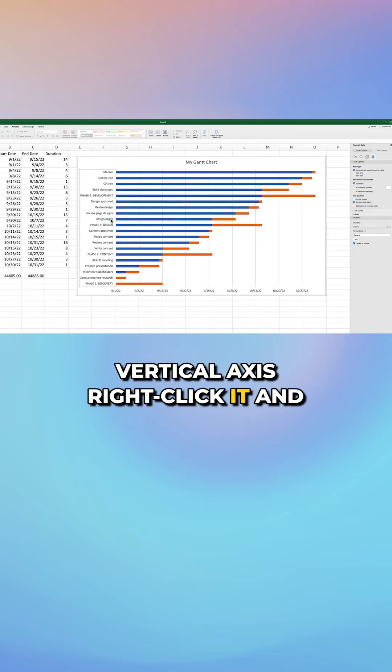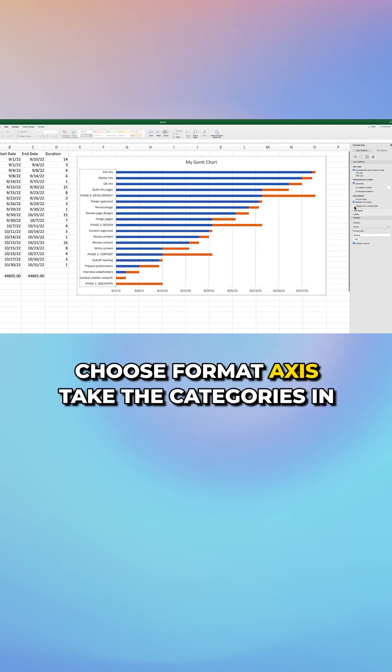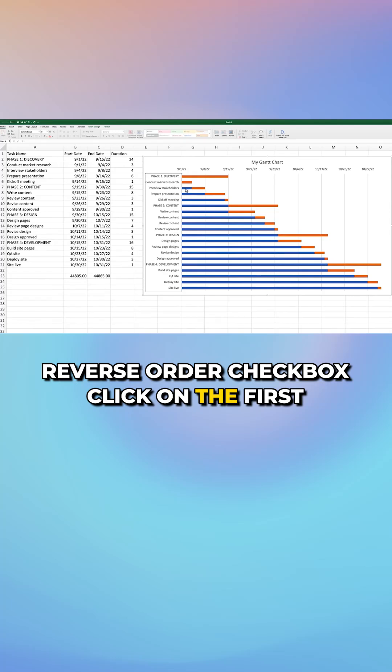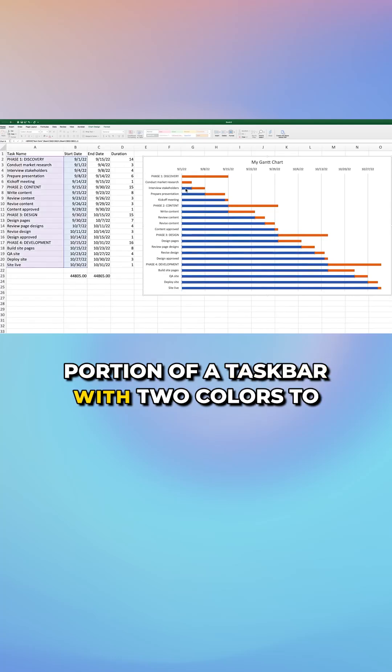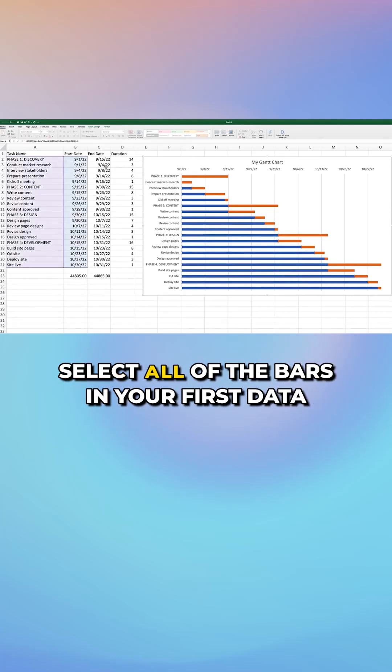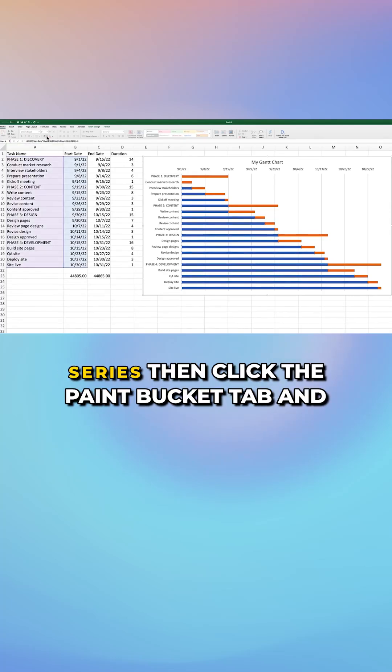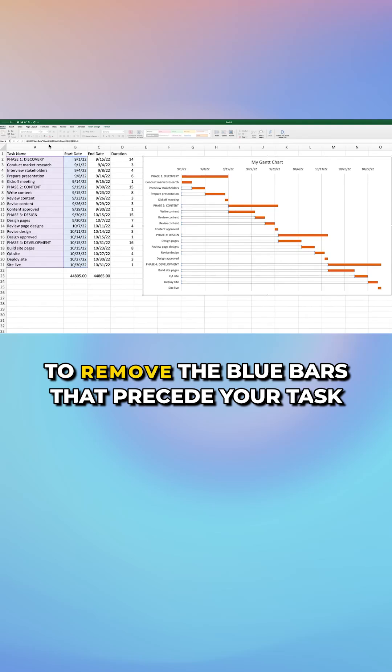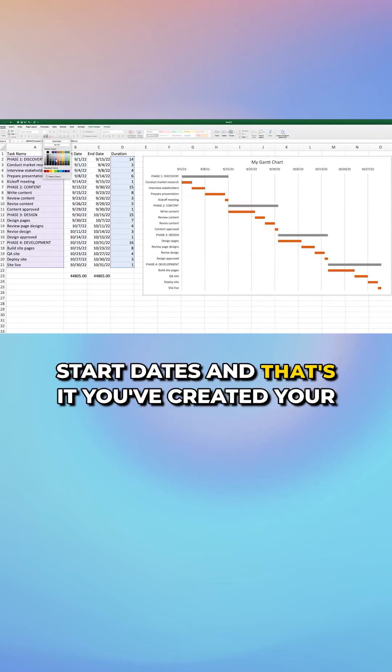Select the vertical axis, right click it, and choose format axis. Tick the categories in reverse order checkbox. Click on the first portion of a taskbar with two colors to select all of the bars in your first data series. Then click the paint bucket tab and expand the fill section. Select no fill to remove the blue bars that precede your task start dates.